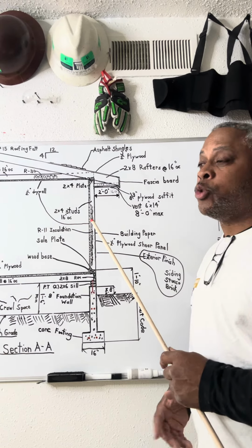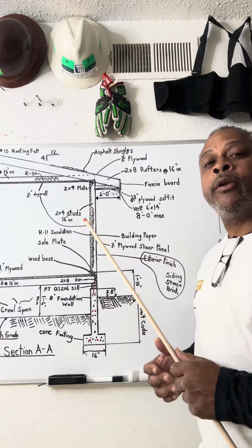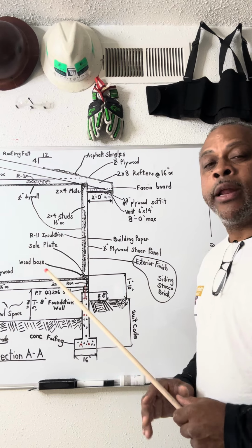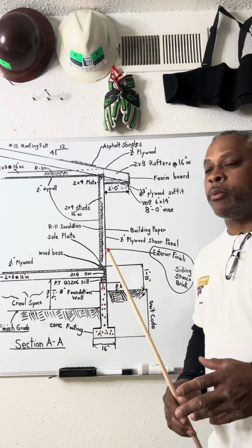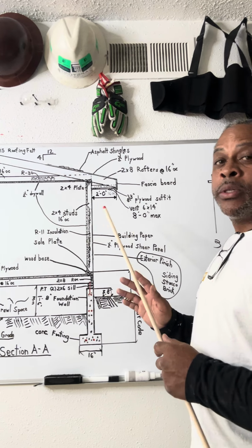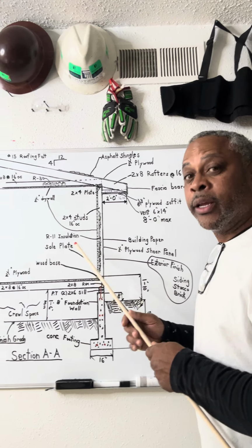And on big jobs, you have to do an RFI. An RFI is a request for information. That means they're not on the job site. You have to fill out this form, fax it over to them, and give them critical information on where you're looking and what the discrepancy is on the other plan that's saying one thing versus another here.